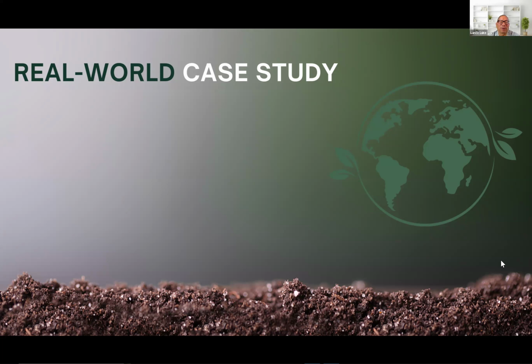So he was guilty because he never got a soil study. He never forced the owner to do it. He didn't have to pay for it. He could have told the owner, you know what? You have to hire an engineer and get a soil test done so I know how to build the house. But he didn't.